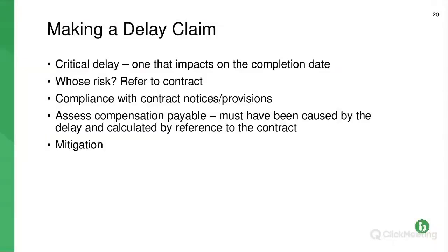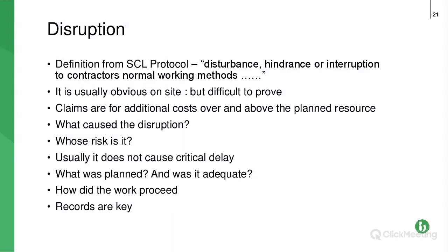And it obviously can't include the delay caused by, for example, the contractor not having sufficient personnel on site. And of course, as with all contractor and subcontractor claims, you've got to consider mitigation. This isn't an open cheque. We've got to consider how to reduce those delays and reduce the extra time and the extra money. So that's what we've got to prove.